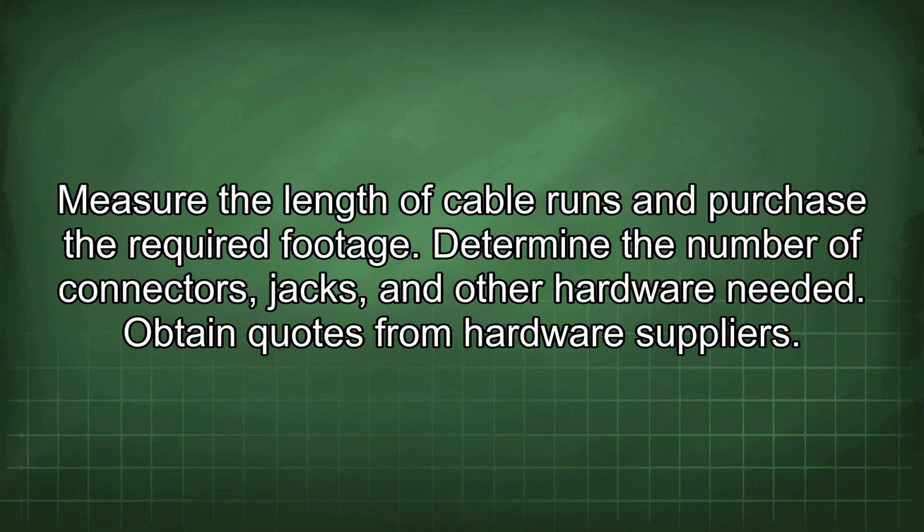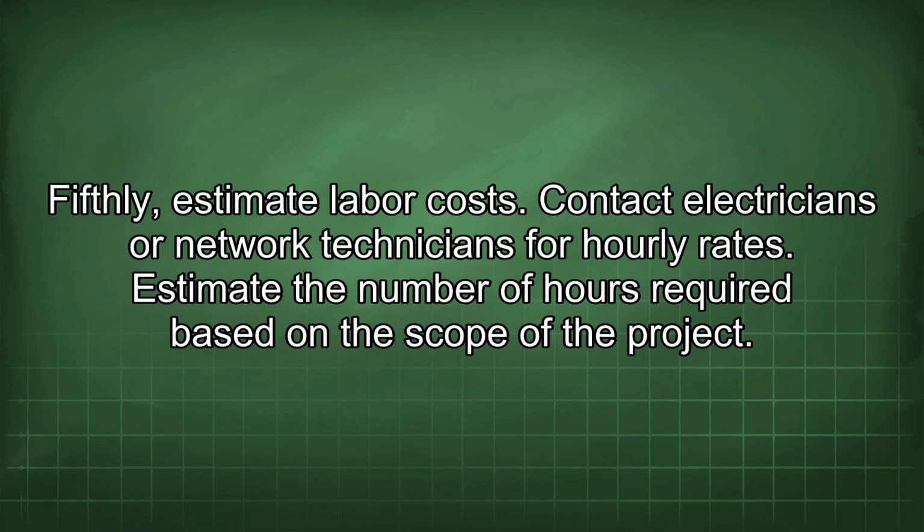Fourthly, calculate material costs. Measure the length of cable runs and purchase the required footage. Determine the number of connectors, jacks, and other hardware needed. Obtain quotes from hardware suppliers. Fifthly, estimate labor costs. Contact electricians or network technicians for hourly rates. Estimate the number of hours required based on the scope of the project.